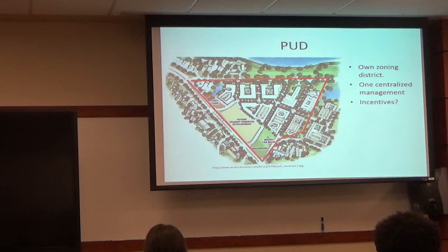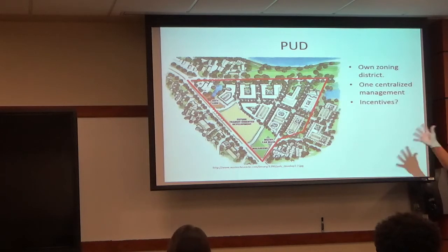I got excited during my career as a planner on every dawn, that's a technical term, dawn, fence permit and deck permit. You buy a home from a home builder, you see all these model homes with a really cool barbecue deck. You buy it, and then you realize, hey, I don't want to add the $15,000 for the deck right now. Just okay with the home, so you get the house. 2 years later, or even a year later, I really would like to have the barbecue deck now. But you need a permit for that, because the building was done without. Then you realize that barbecue deck was never actually allowed, and now you go in front of council and ask for a variance to change the law and the permit, yeah, because zoning is law. And that's really great. One guy gets it, the other one doesn't get it, and they're neighbors. So there's going to be lots of fun on that.